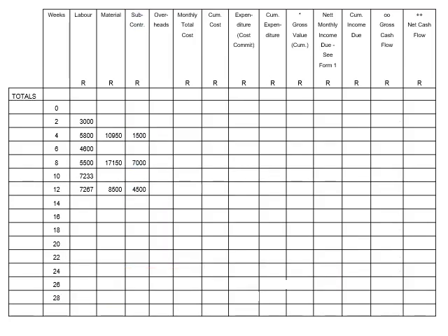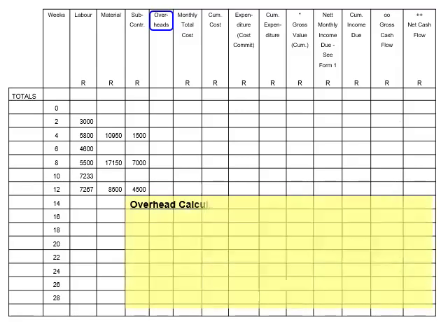You will remember that the information, relative to overheads, in the introduction to this exercise reads as follows. The total fixed overheads have been estimated at 3,000 Rand, and is divided equally for each month. The total variable overhead costs have been estimated at 4,000 Rand, of which 50% is allocated to the first month, and the remaining 50% is equally divided into the last 2 months. We only have one column for overheads in our worksheet, which means that fixed and variable overheads need to be added together. In order to do this, let us analyze this information in the introduction.